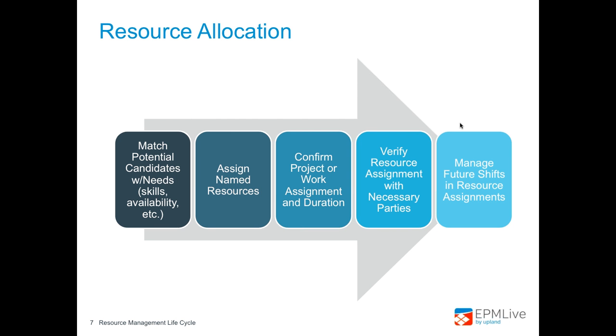In addition to the environmental factors, a roles and responsibilities document is always helpful. It should be completed prior to assigning resources, showing who's going to be doing what. An organization chart would also aid in this process when determining the resource assignments, and so would viewing the preliminary project schedule to see when each resource is needed and for how long.